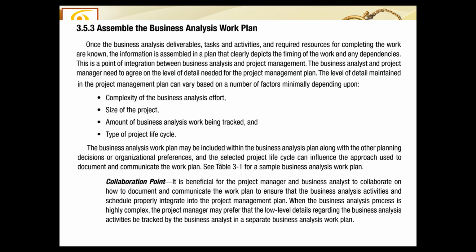Next is assemble the business analysis work plan. So we talked about the business analysis work plan. Now we have put in place all the ingredients, and these ingredients have to be put together to assemble the business analysis work plan. Once the business analysis deliverables, tasks and activities and required resources for completing the work are known, the information is assembled in a plan that clearly depicts the timing of the work and any dependencies. This is the point of integration between the business analysis and the project management.